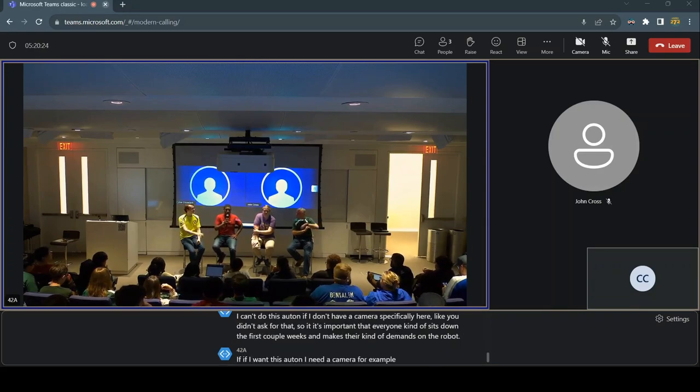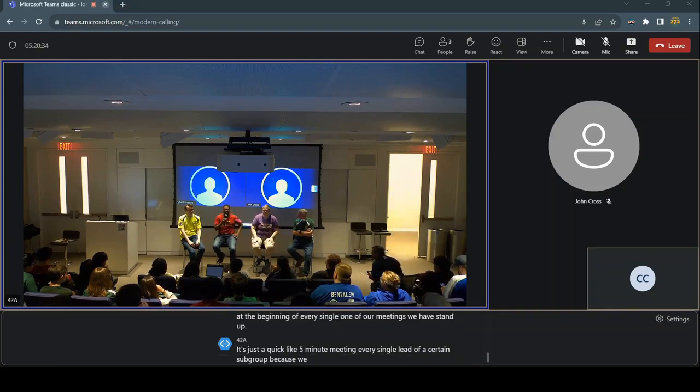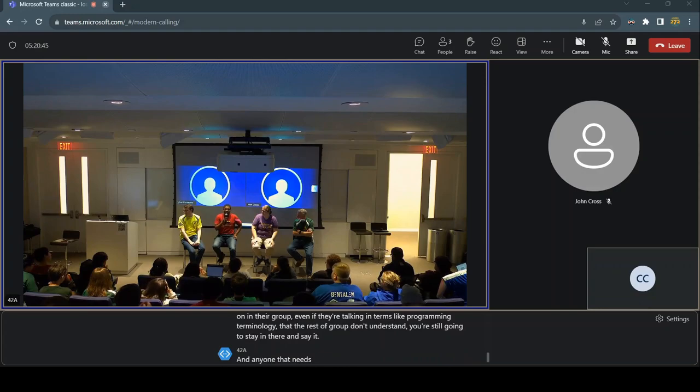Also, quickly on that, at the beginning of every single one of our meetings, we have a stand-up. It's just a quick five-minute meeting. Every lead of a subgroup, because we also have a fairly large team, says what's going on in their group. Even if they're using programming terminology that the rest of the group doesn't understand, you still stand there and say it. And anyone that needs something from another group, there's the time to say it right there.